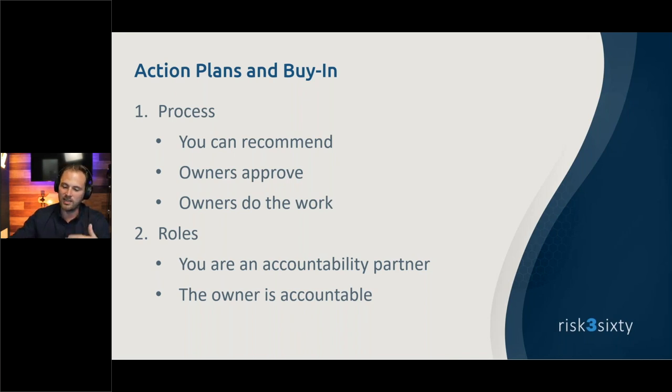Let's say you have an engineering policy gap, that SDLC doesn't have a policy. It's not appropriate for you to sign them up for work. You have to go through the hard step of getting the owner of that control to agree to write that policy and agree to a due date to write it. Your role is really the accountability partner, but they're the owner. So don't forget to do that.